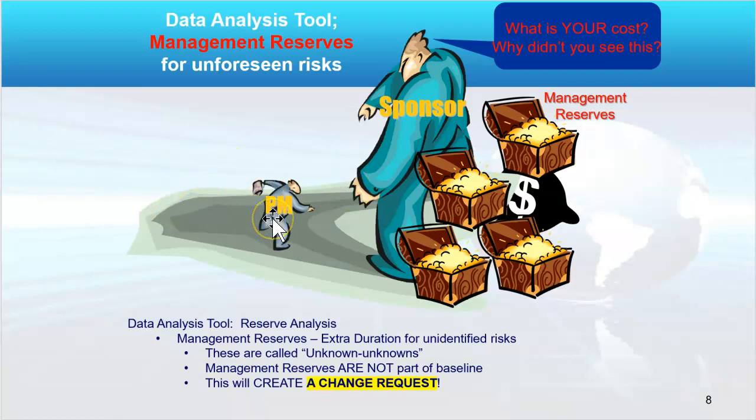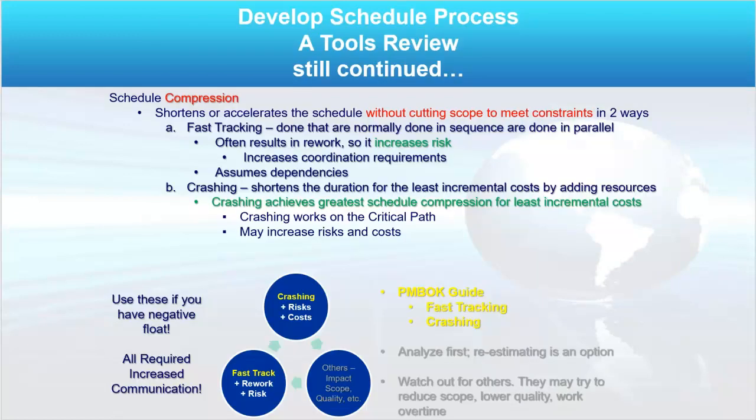As a manager, I generally will set aside about 12% of the proposed budget for management reserves without sharing that with the team. Now, as I walk through this, most schedules we've ever known fall behind. That's just a reality of life. So project management offers us a couple of ways to address that: one is called fast tracking, and the other is called crashing.